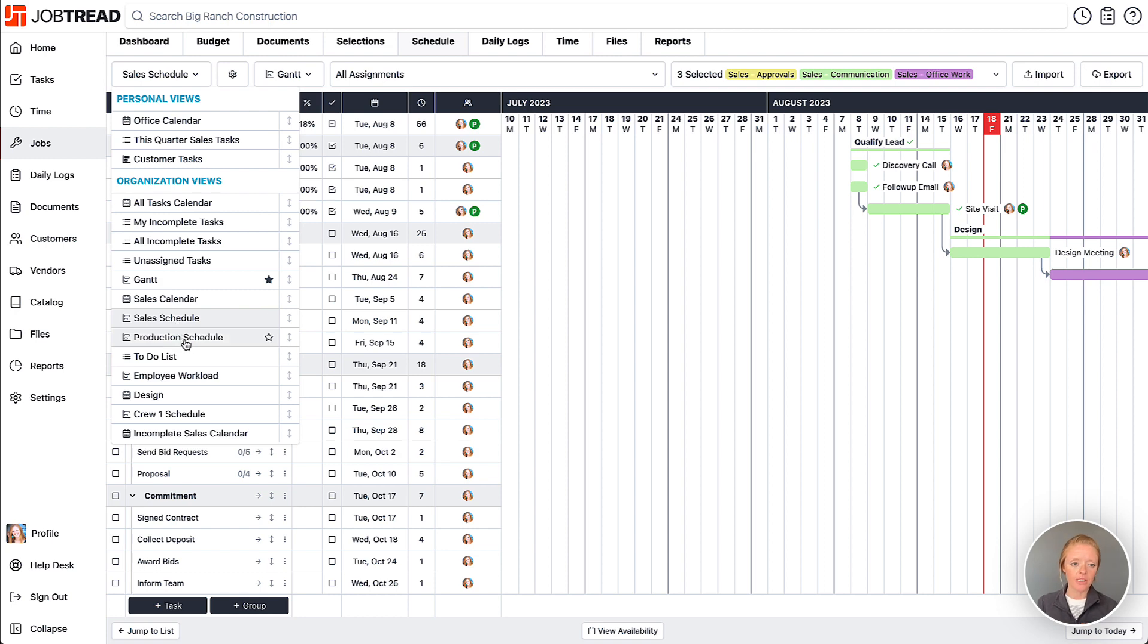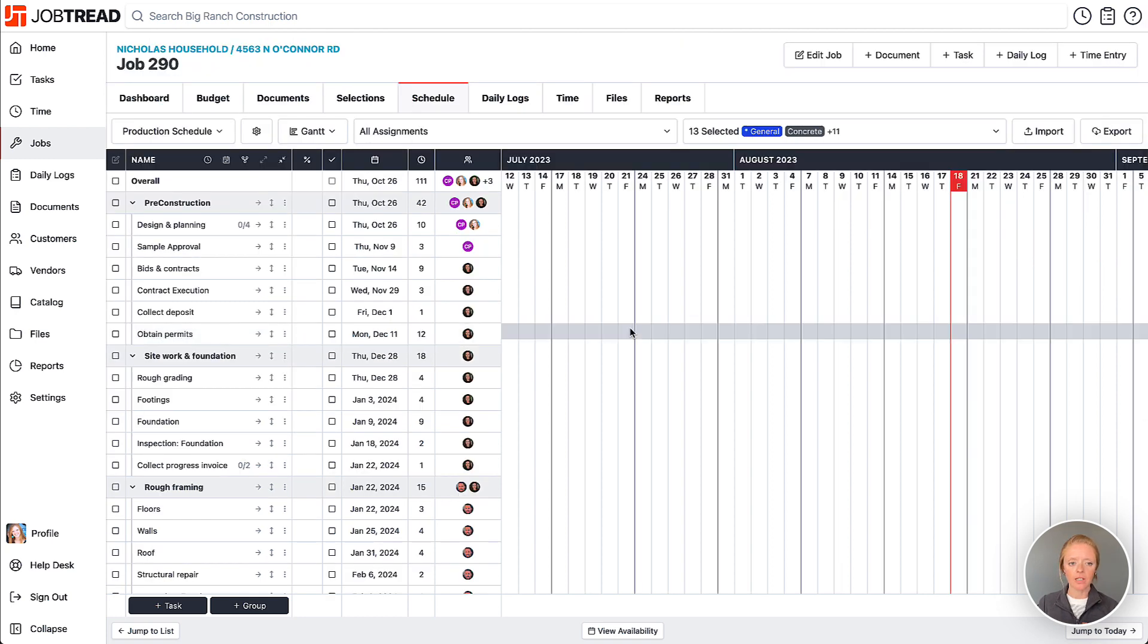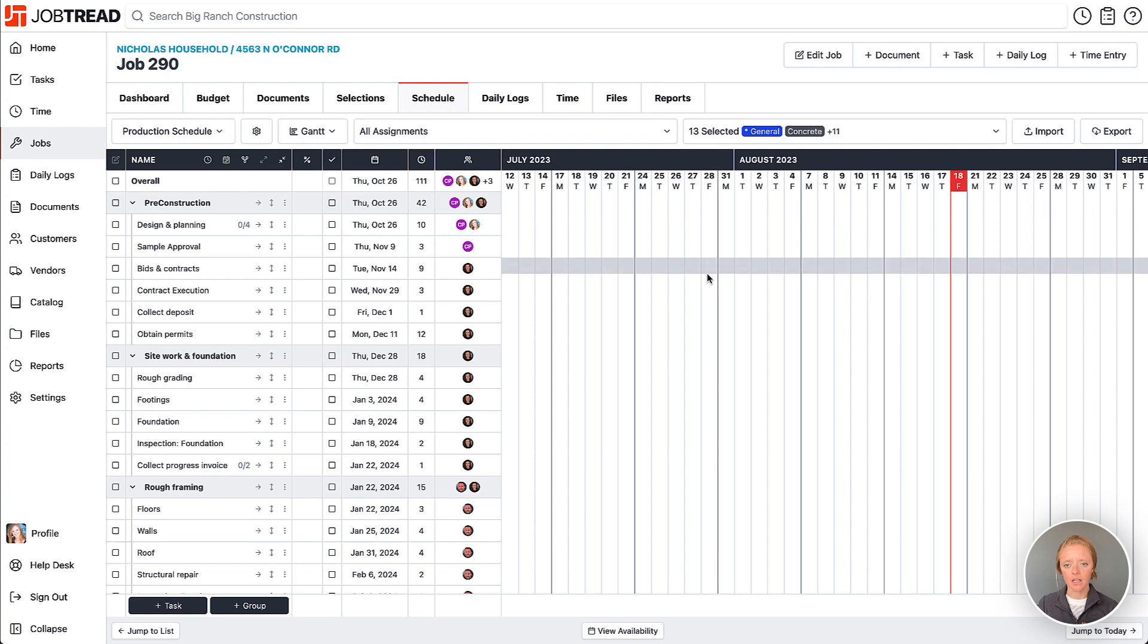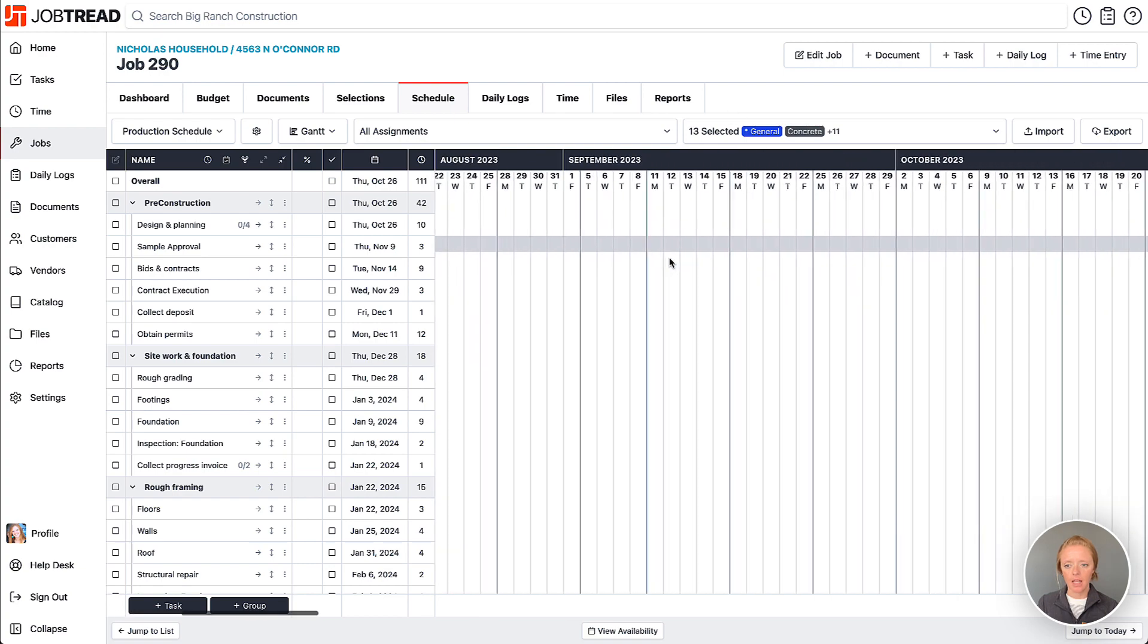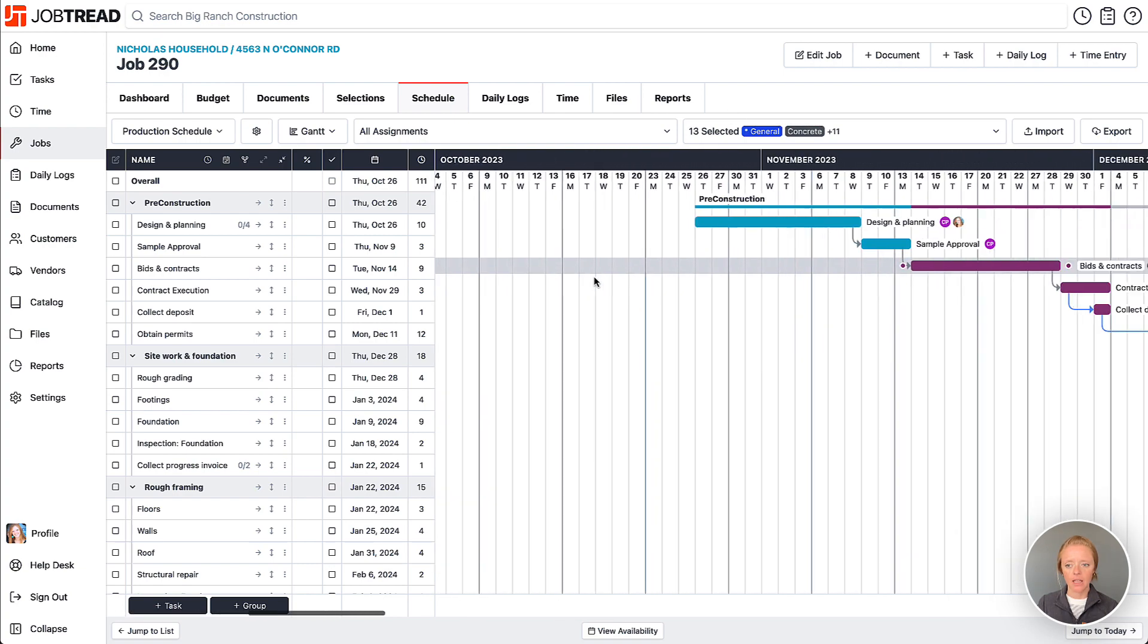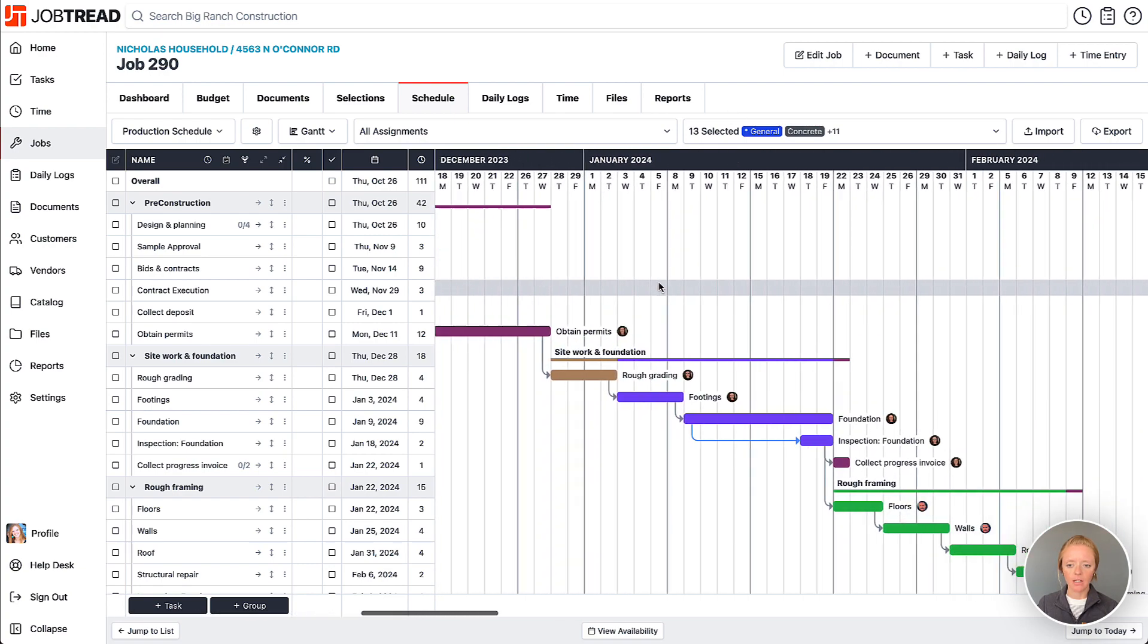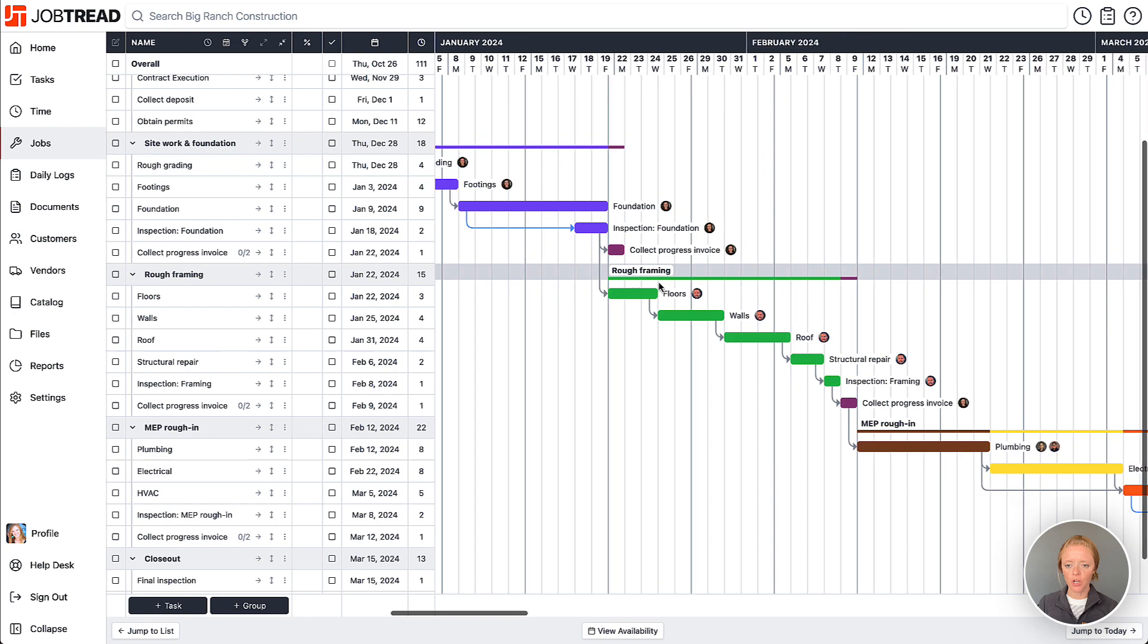If you open up your 'Production Schedule,' it's limiting all of your tasks to the production-type tasks, and you can then just see your entire production schedule for this job. This will carry over to any other job that you're using the schedule for.